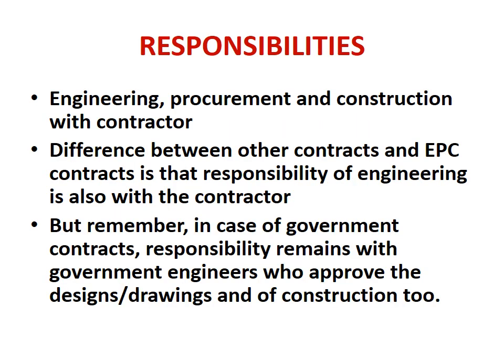So let us talk about the responsibilities. Engineering, procurement and construction is with the contractor in EPC contracts. The difference between other contracts and EPC contracts is that responsibility of engineering is also with the contractor. But remember one thing, in case of government contracts, responsibility still remains with the government engineers who approve the designs or drawings, and of construction too. So it's not that the EPC contractor will be responsible. In government organizations or government contracts, responsibility will remain with the engineer even in case of EPC contracts.